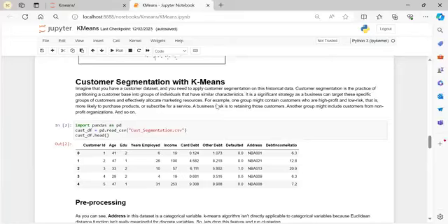Then we will decide on the milestones. Though it is a 10-week project, we work in 2-week sprints, and after every 2 weeks we will deliver things. Let's suppose after 4 weeks there would be a milestone where we will deliver 50% or 60% of the overall solution. Like that we will keep delivering, and then wherever they want us to deploy, we will go and deploy that particular project.